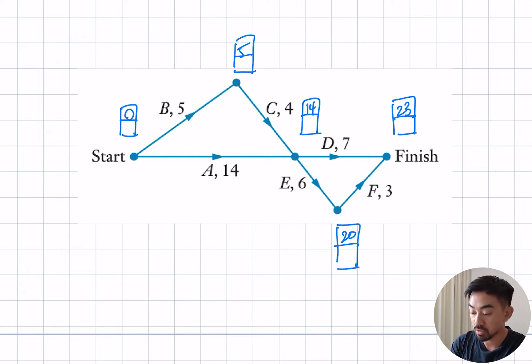Let's do a backwards scan. Start at the end, 23. Work my way backwards. You notice here I actually have to go down first because before I can go here I need to get down here to figure out if that one will clash. 23 minus 3 is 20. What's 23 minus 7? That is 16. Is that smaller than 20 minus 4? No, that's 14. 20 minus 4 is 14.